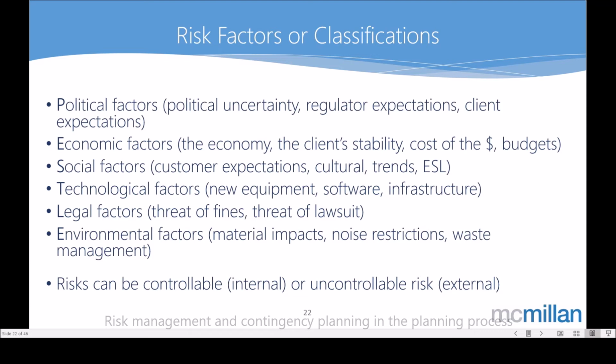It can be economic in terms of the economy itself, or it can be in terms of our internal economy, financials. We're sure we've got funding at the start. Is there a risk of that funding dollar dissipating or perhaps being pulled out from us towards the end of the plans? So that's an example of economic risks.